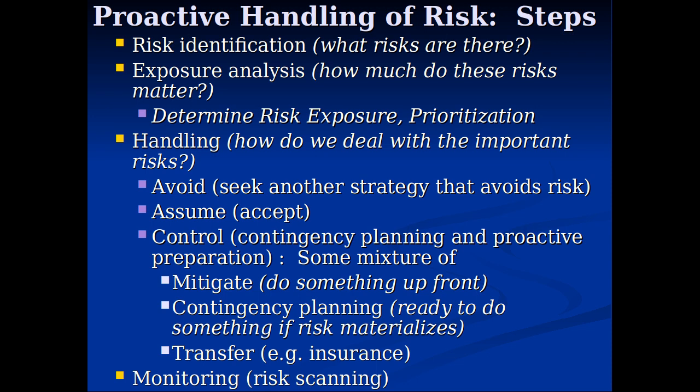Okay? Ladies and gentlemen, those are the main two things I want you to know about. But this last thing is equally important. For the risk manager, this is absolutely central. You've got to monitor. Risk management is not something you do only in the first week. It's something you do throughout the term. You're monitoring: is one of these risks we identified earlier coming about?